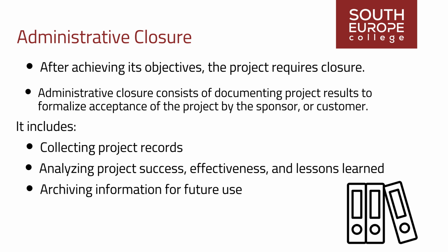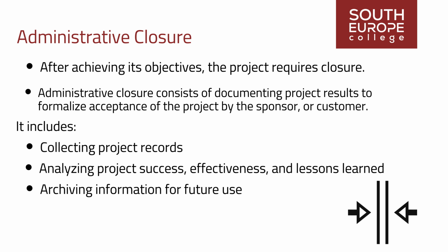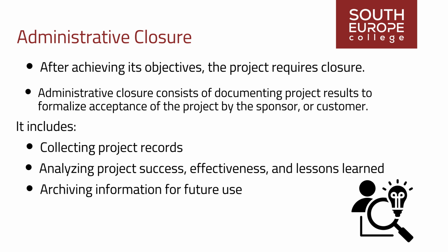Administrative closure activities should not be delayed until the project's completion. Each phase of the project should be properly closed to ensure that important and useful information is not lost. In addition, employee skills in the database should be updated to reflect new skills and proficiency increases.